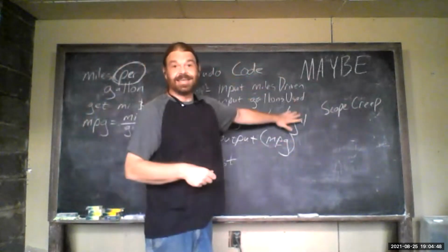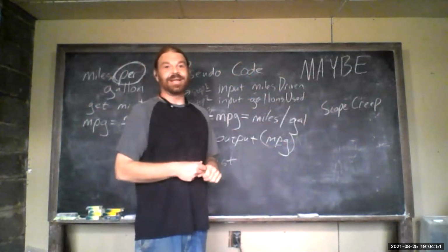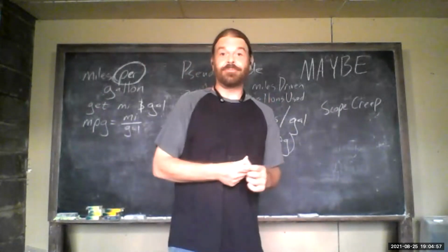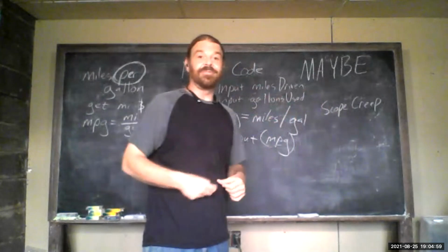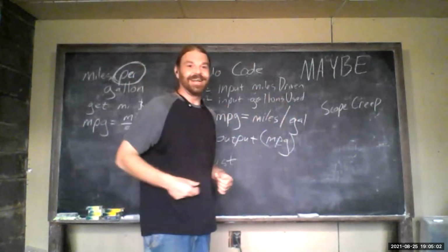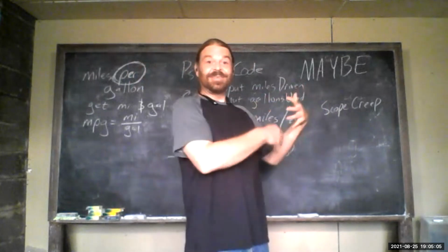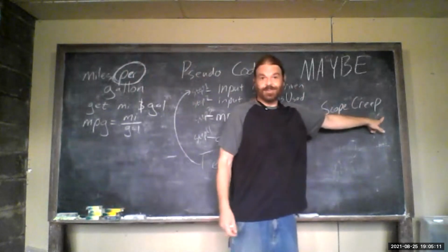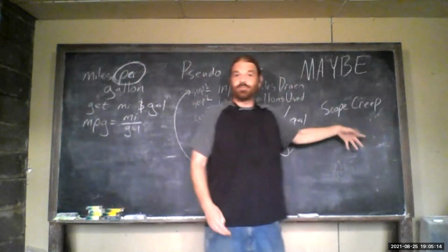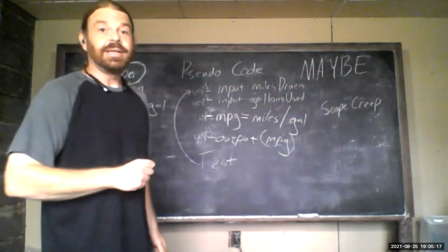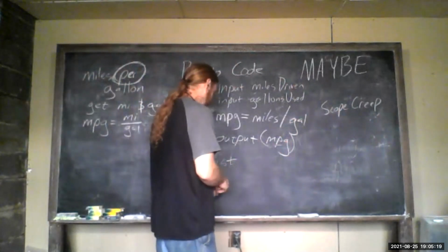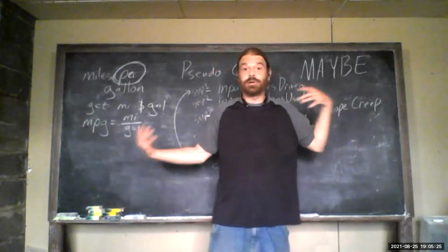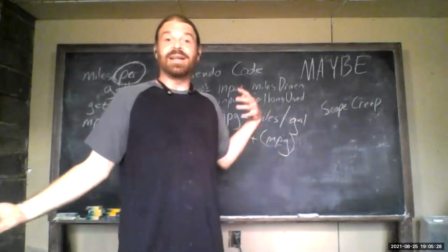The waterfall methodology is a nice way to avoid that, because then we can have a great phrase, which is, wherever you're heading in IT, a very useful phrase to remember is, that'll be a great thing for version 2. That'll be a great thing for the next upgrade. But we should get the original one done, and then we'll put that in the upgrade, because customers will keep thinking of more and more ideas, and projects will just grow and grow and grow. That's kind of happened to a lot of people building software for customers. It just keeps growing and growing, and suddenly there's not even an end in sight.